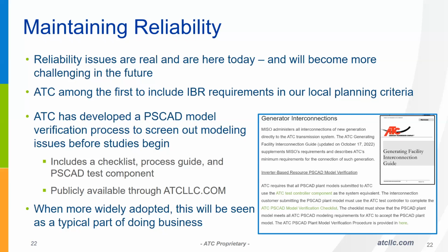And this is new for our latest queue cycle, but it already seems to be saving us and our customers time and energy. Previously, we'd have months of back and forth before getting the models to work well, but now the interconnection customers can perform some of those same verification tests that we do before they submit the models, so they can see the issues and fix them on their own before submitting the models to us.